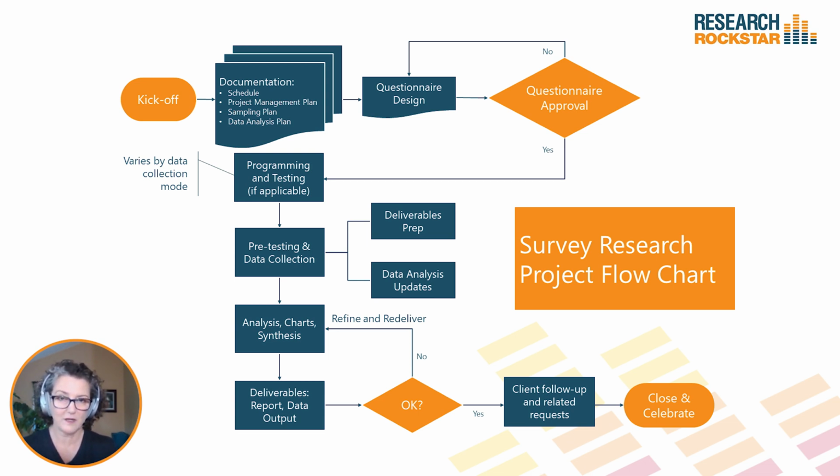This is the place where you and either the clients or stakeholders or other collaborators need to make sure that everybody has absolute clarity about what the project is about and what the expectations are about how it's going to be delivered. And after the kickoff meeting, if you're the project manager, you're responsible for delivering some documentation. It's very important in professional research that we document the key decisions that were agreed to during a kickoff meeting, just to avoid any misunderstanding.